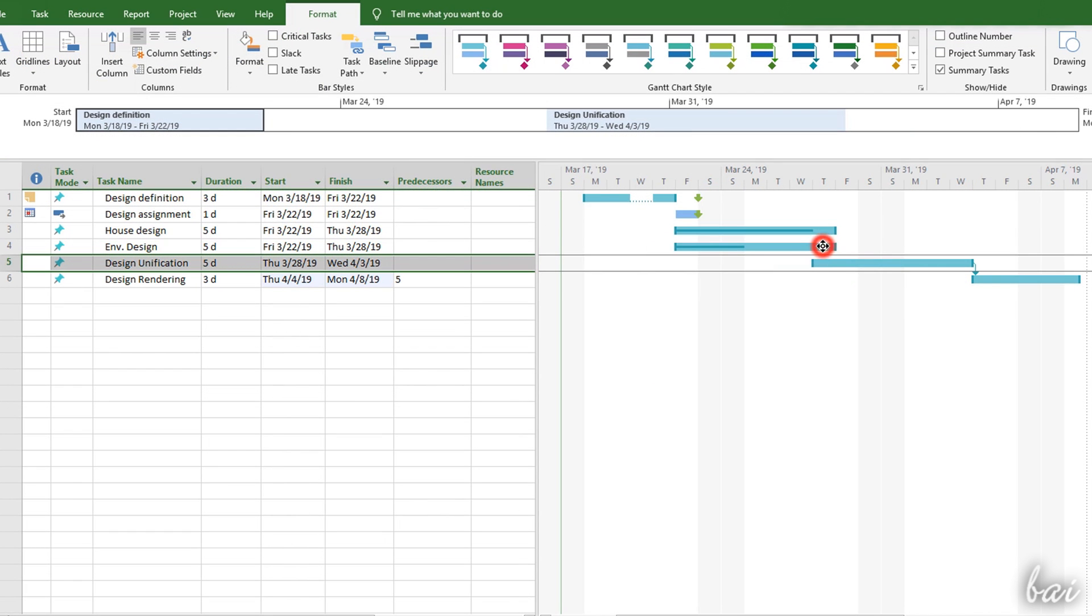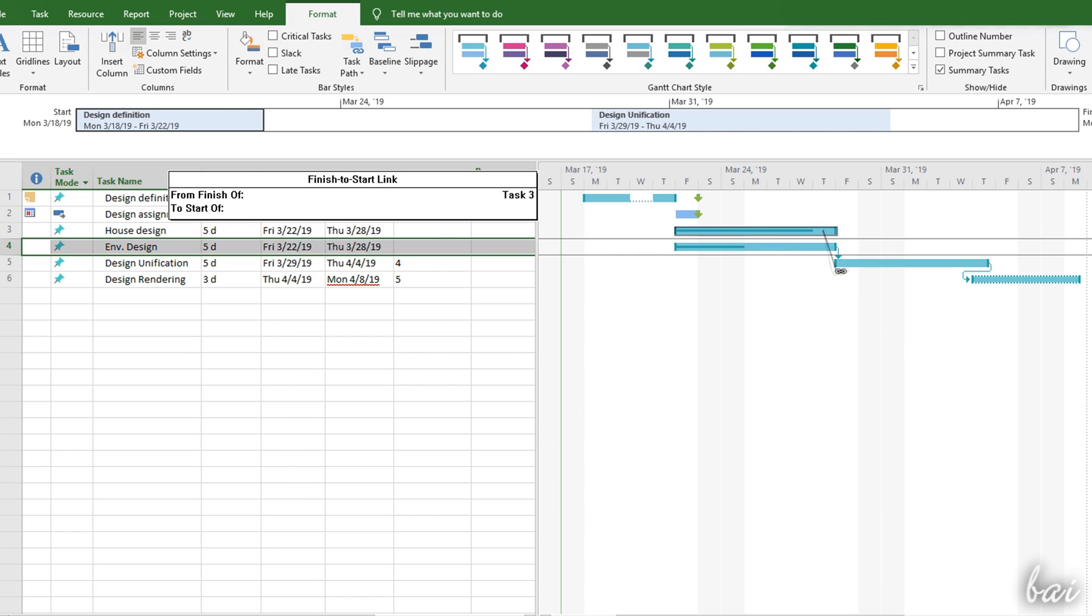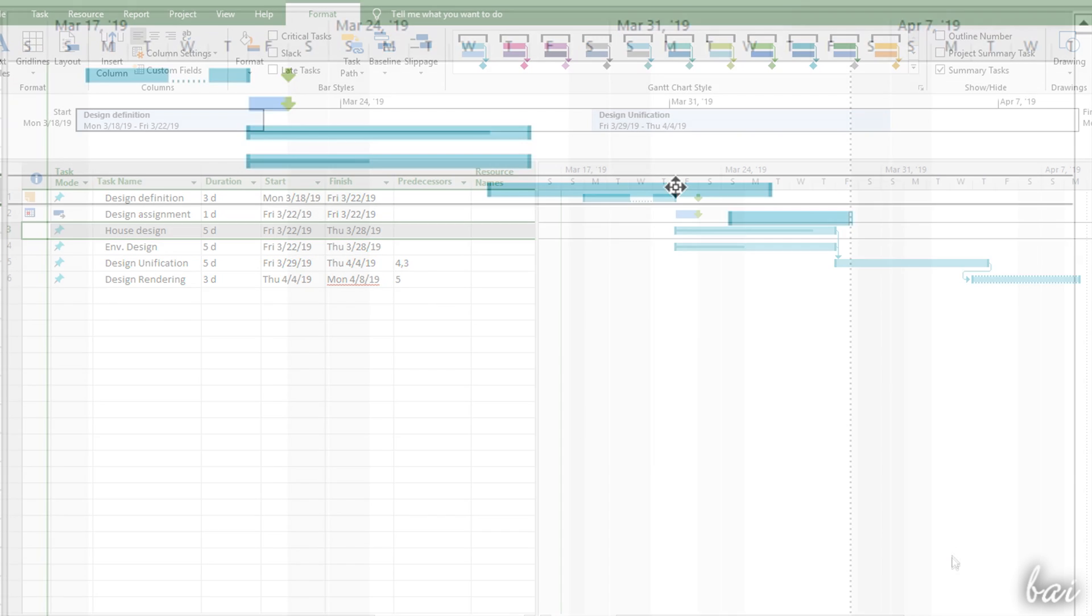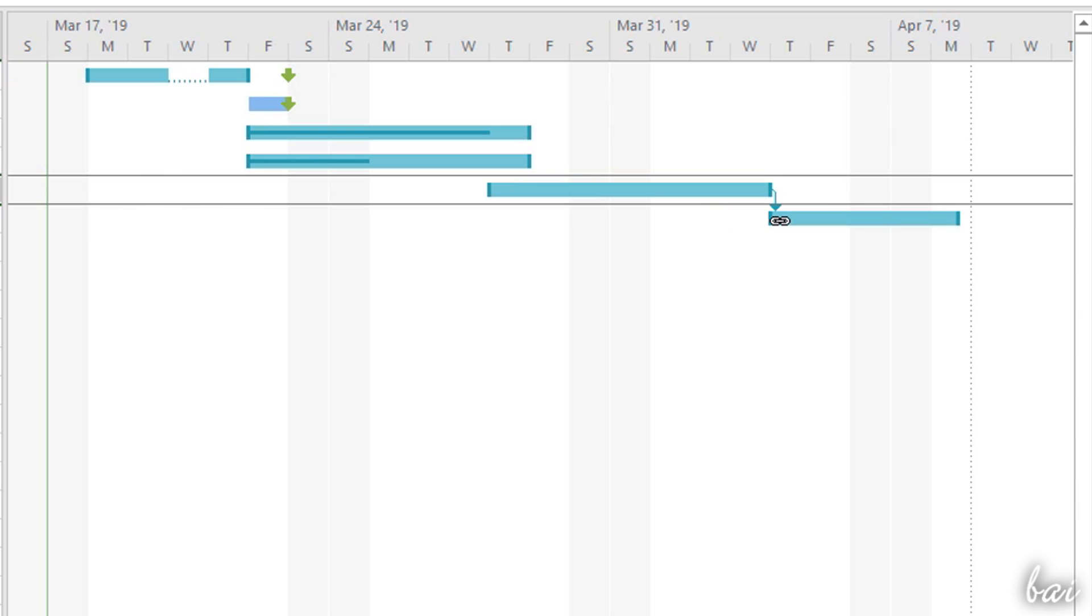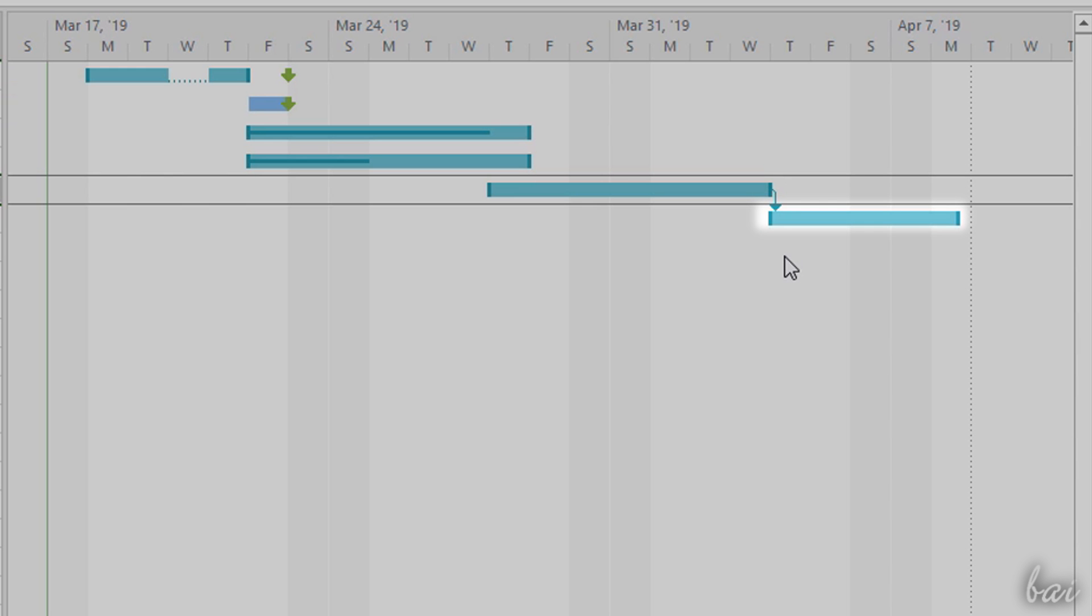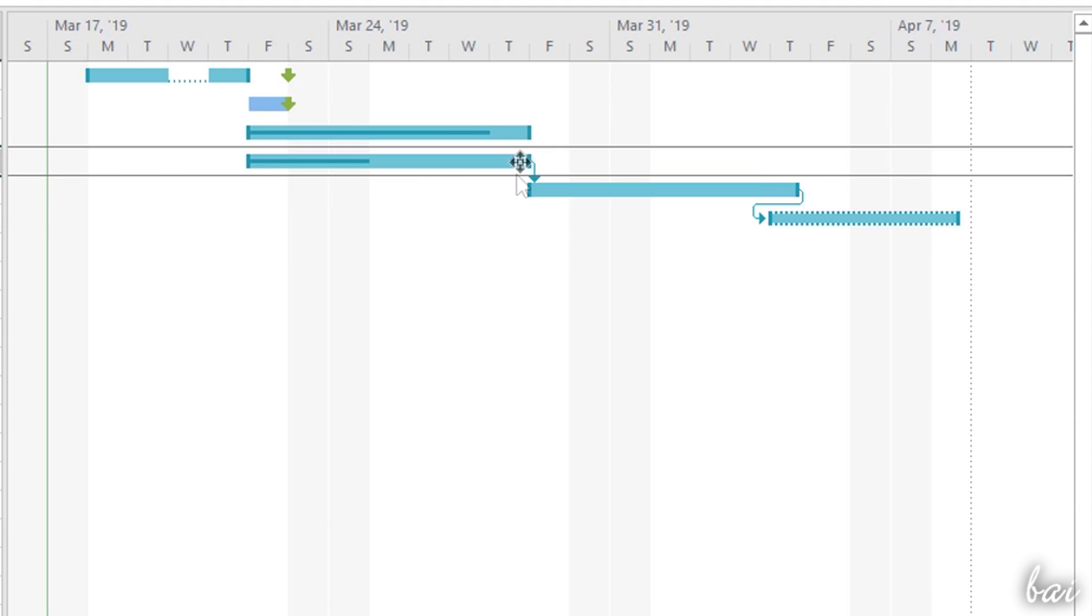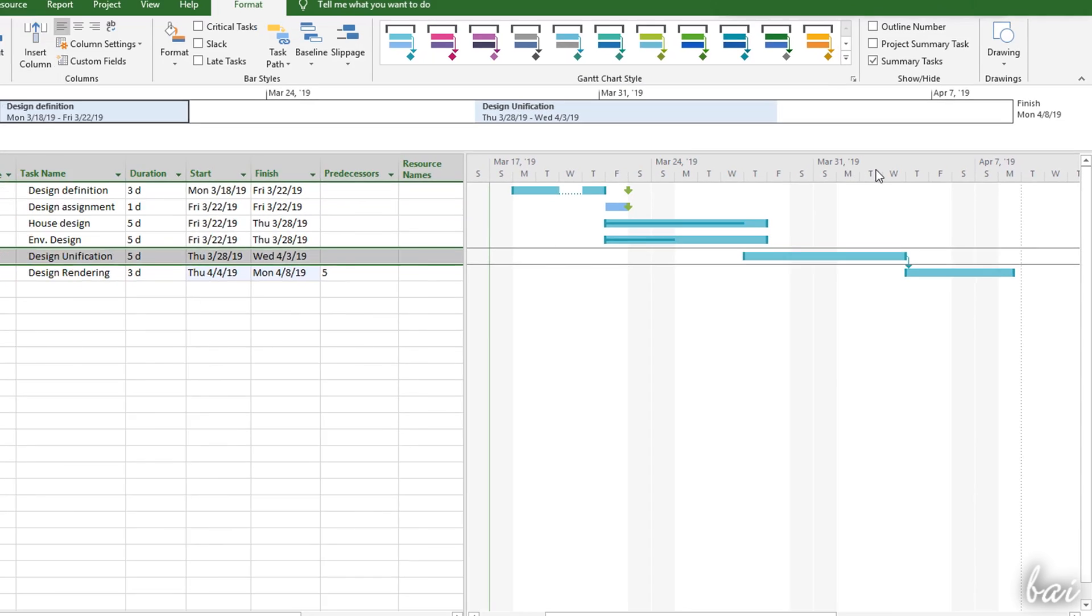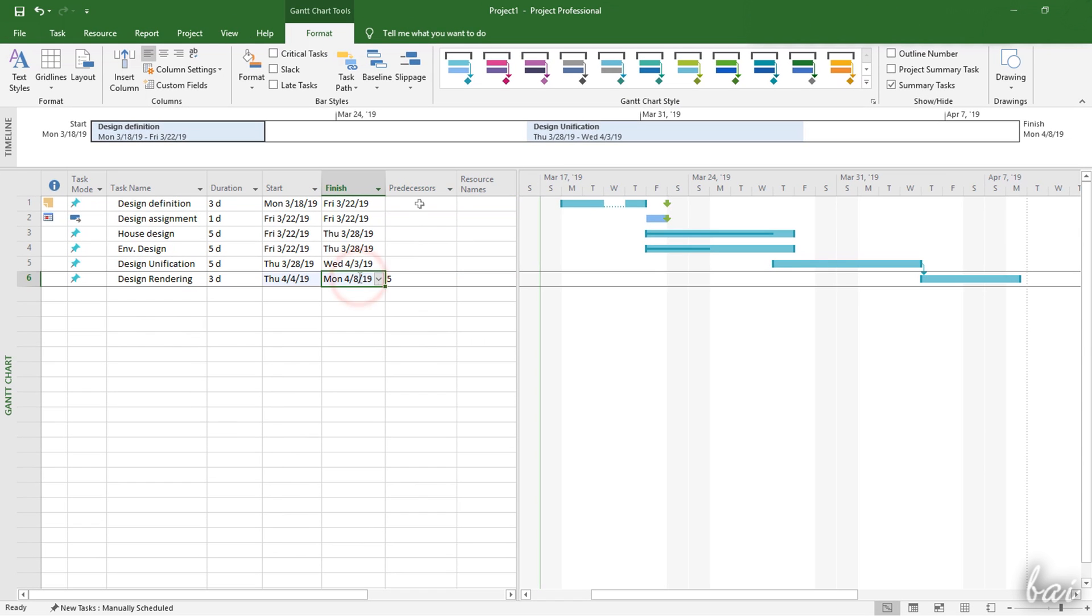You can add any dependence between two or more tasks by using the links. If you click and drag from any task vertically, your cursor shows a chain icon that you can move over another task to create a dependence between two tasks. By default, this creates a Finish to Start link, where the second task can start just when the previous one called Predecessor finishes. Each task can also admit multiple predecessors.